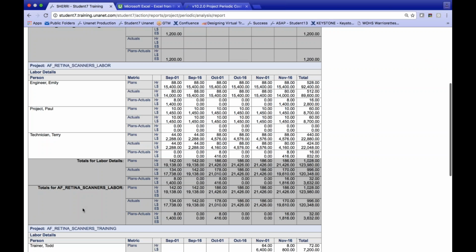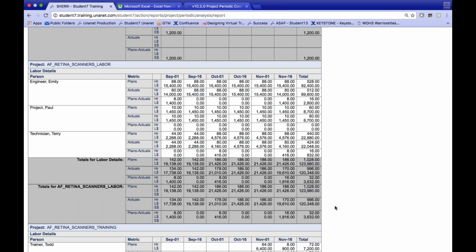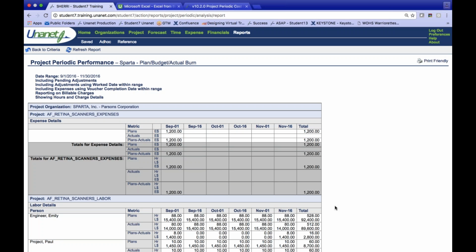And I do have my variances here, probably a date in Labor Day and a date in Thanksgiving for a couple of my people here. So that's probably where my differences have occurred. I've got 32 hours total and where that billable amount has come from. So the lesson learned here is that I need to plan around those holidays and know when those holidays are, and plan instead of 40 hours per week, maybe 32 during those weeks.